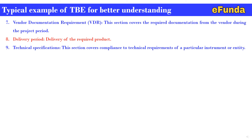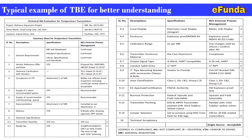Now we will see one typical format of a TBE and discuss it briefly for better understanding. Typical example of a Technical Bid Evaluation for a temperature transmitter. One can see the typical template used based on the project. Here we can cover the summary sheet for the temperature transmitter, where we have covered the description as part of the details discussed in our previous part of this video, covering description, specification as per the MR, and Emerson Process Management is the vendor considered for providing the technical offer, for which compliance is already provided. One can see the legends mentioned in the right-hand side table where C is compliance, NC is non-compliant, D is deviation, VTA is vendor to advise, and M is material requisition.